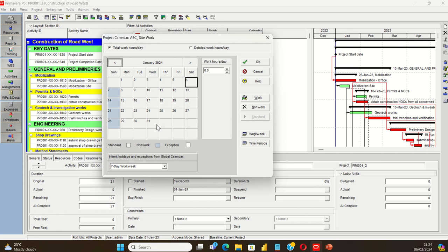You can't always keep to the plan dates or the baseline dates. So when you get to that point, Primavera should automatically be able to capture the right date. So you better create the calendars based on whatever the requirements are in the conditions of contract, for the next 2 years basically.